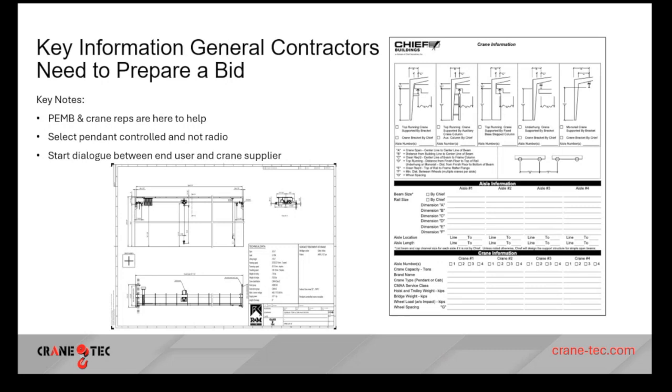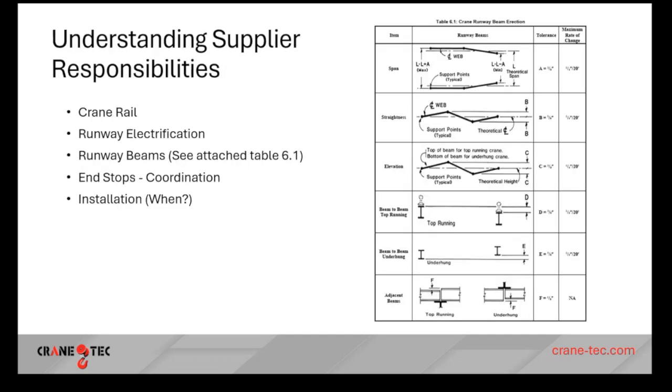Or even on the drawings, if the architect wants to take the time to mandate that and do a call out, even better. But I think for the general contractors on this Teams meeting today, don't be surprised when you get that question. And maybe everybody just has an understanding it's part of the RFI process when you're putting scope of work together. But that's always going to be one of my hot button issues for sure.